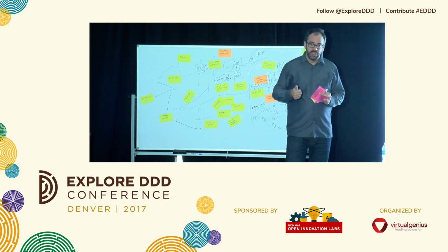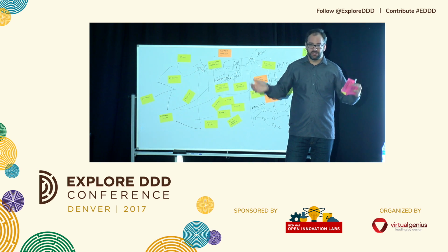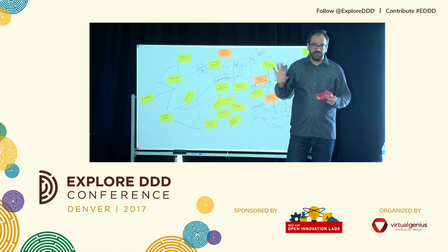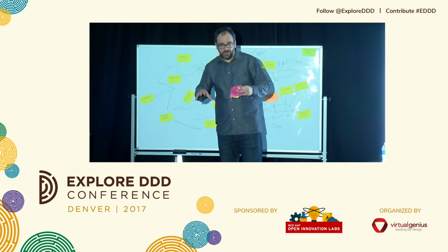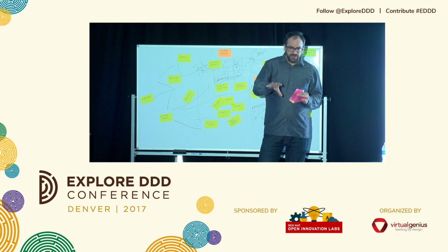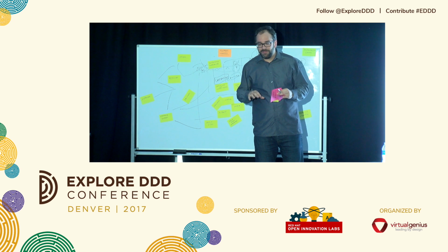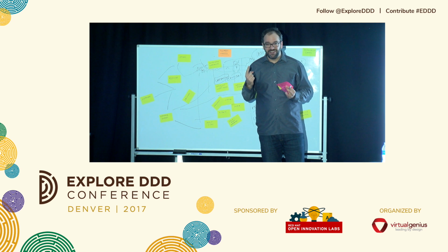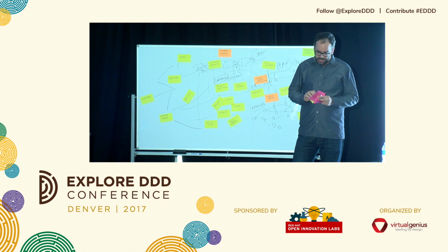Definitely do these sprint zero sessions where you get everybody in, make it a couple of days workshop, do event storming and different kinds of modeling, and try to find everything that could possibly go wrong in the future. And there will be people there saying, yeah, but we don't need that now. We're agile. We're just going to build the one thing. But those couple of days of exploring, how far could this go? What if, putting pressure on the model: if this happens once in a million times, but we grow and we have 1 million users, then this happens every day, right? And then we care about this. So do this sort of big upfront discovery, and the multi-perspective modeling that I was already mentioning.